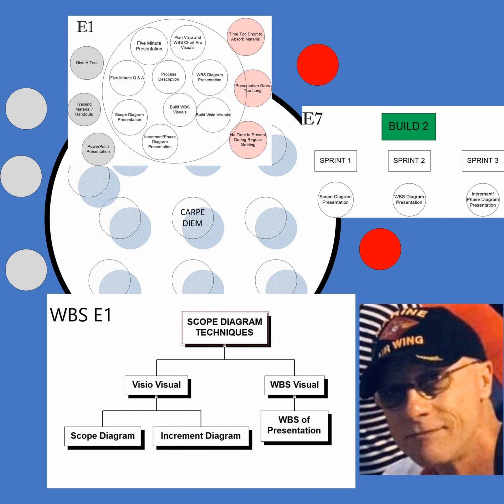So this project is, let's say, 12 months. And we'll do the analysis. And if you think it should be in the scope, we'll tell you how much longer, how much more money it'll cost, how many more resources we need. But if you've already figured out that that scope and that work breakdown structure is a year, let's just throw a number out, 10 million a year, and these many resources. Well, what they add could add 6 months, could add another 5 million, right? And you may need twice the resources. So once you present that to upper management, say, hey, it's going to add another 5 million, it needs more resources, and it's going to take another 6 months, then they may say, no, that's not part of the scope.